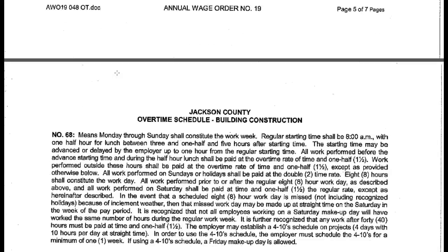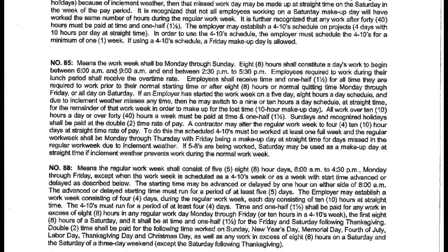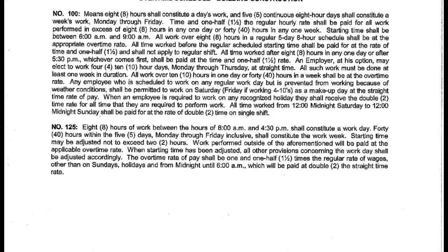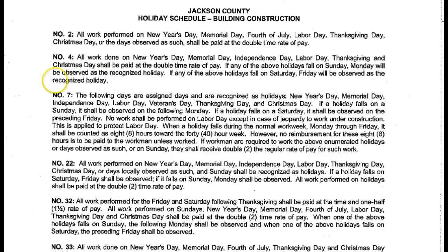So for each of the different classifications, you go through that table that we looked at originally, you're going to find which of these schedules applies, and that's for overtime. Now if you go further, you'll see holiday. And remember, we looked and we saw that for those masons, item number 4 applied. What's that say? It says all work done on New Year's Day, Memorial Day, Independence Day, Labor Day, Thanksgiving, and Christmas Day shall be paid at double time rate of pay.